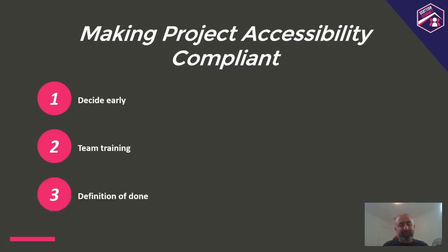One thing we did was, once we decided we were going to comply with accessibility guidelines, that was an agile project, so we included accessibility compliance as a part of the definition of done. So it becomes a little easier from the beginning, from development and while doing testing, at every stage it becomes easy to follow.